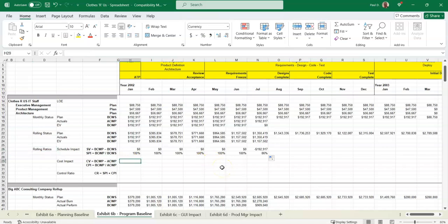Different story here for LOE, in that you can overrun or underrun LOE based on who's on the project, what their salaries are, how many people. It's easy to control because you know exactly what you're putting on there and what you're running as far as manpower goes. But if you need additional program management, additional supervision, additional management skills, you can potentially overrun even LOE.